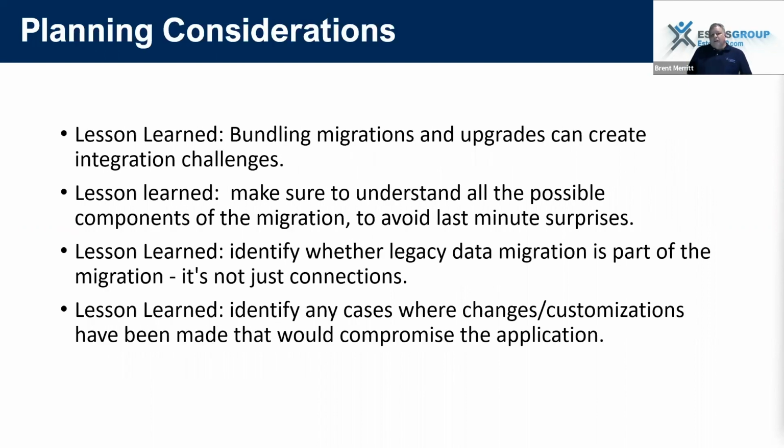Bundling migrations and upgrades can create integration challenges. That is very true, so don't try to do it all at one time. Do it in pieces. Just like I stated earlier, when we do a project, we don't just try to have it done in 2 days. We try to make sure everybody's on the same page. We put it in phases, and within those phases, different pieces are assigned to those who know them best. It just makes things go a lot smoother.